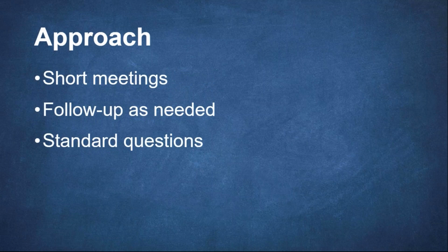I'm not a fan of long meetings, and I question their effectiveness, to be honest. By the time you get to the end of a 1 to 2 hour long meeting, you've forgotten what you started with, or you feel like you want to. Our team generally approaches most situations by scheduling 30-minute meetings for our initial round of interviews. That way, the attendees are more likely to accept. It shows that we are cognizant of their schedules, not wanting to take up a huge amount of their time. And if we need to schedule a follow-up, we will. But it helps us get right to the point and nothing more.